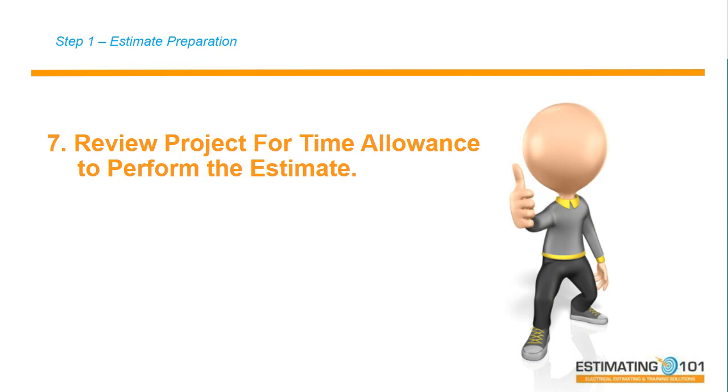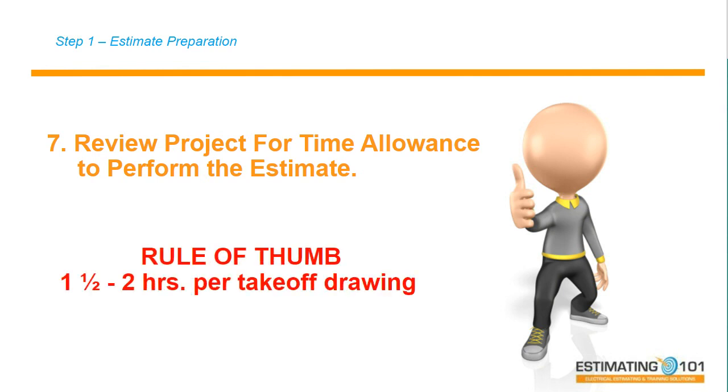If you don't think you can, you should tell him right away that you need some help, or you don't think you can get it all done in a timely manner. My rule of thumb, working with my methodology, my database, and my AccuBid software, I estimated about an hour and a half to 2 hours per takeoff drawing.